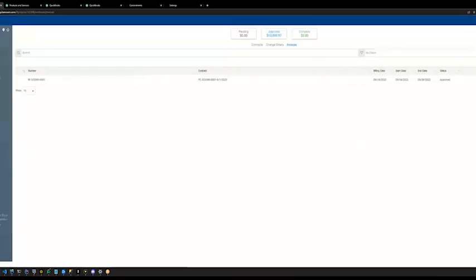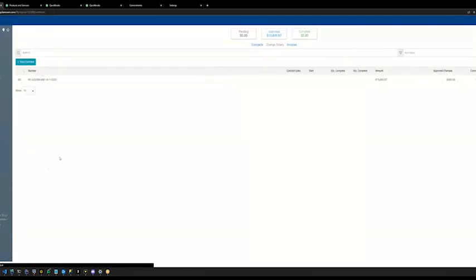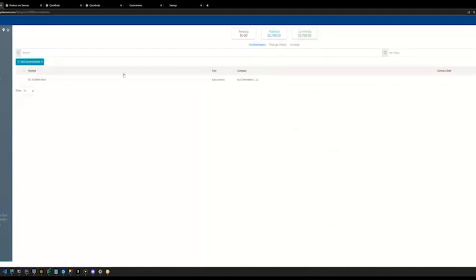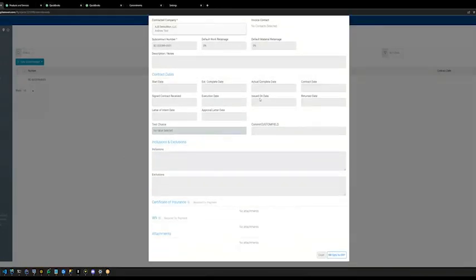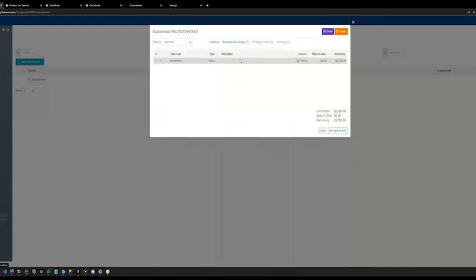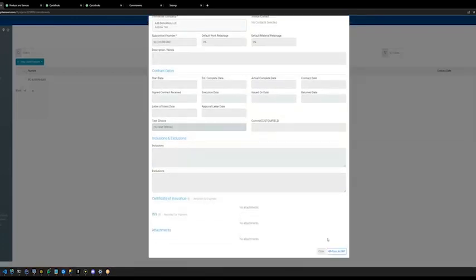All right. So I'm going to go to commitments. And you'll notice that for commitments, the process will be identical. The only difference is that the item it creates in QuickBooks will be a purchase order instead, for a commitment. So I've got this commitment here. I've got a demolition line item, just a single line item for $2,700. It's not synchronized yet. So if I click sync to ERP,